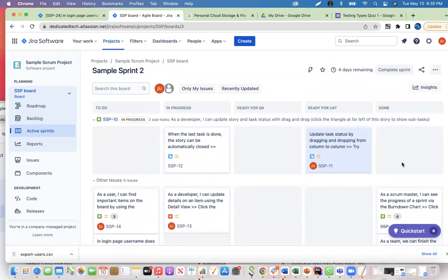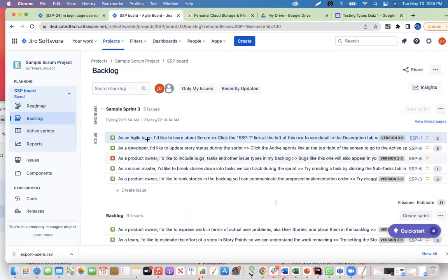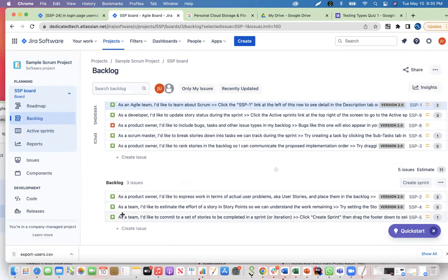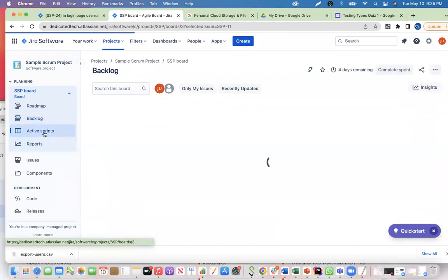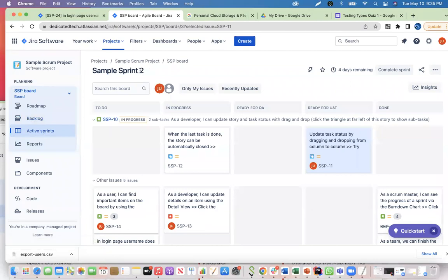So now, you're saying, go ahead. So you were saying we do the grooming first and then do the sprint planning. Yes. Okay. Yeah, before you can even move the story to a sprint, you want to make sure that these stories have enough information. All right. So the grooming will be done, let's say your sprint currently is 2. They will do a grooming during the mid sprint, right? Mid sprint meaning after the 5 business days, they will do a grooming for sprint 3.